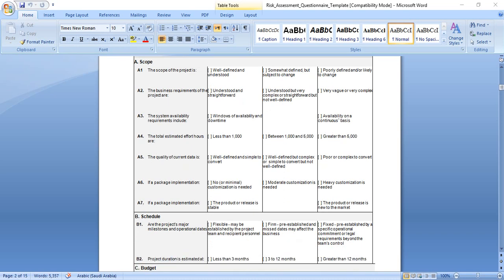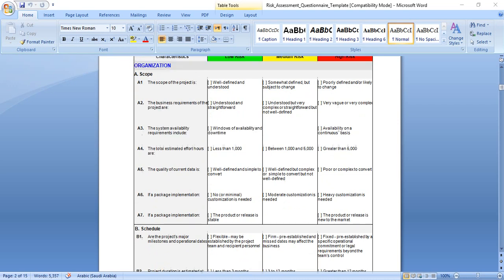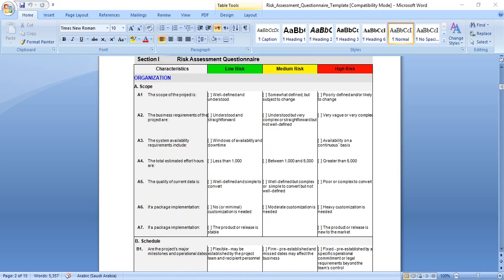The business requirements of the project are understood and straightforward, this means low risk. Understood but very complex, or straightforward but not well defined, this means medium risk. Very few or very complex, this means high risk. This will generate high risk if this is the case, if the business requirement is complex and not really defined or understood by the team. It can generate high risk and make the project fail.